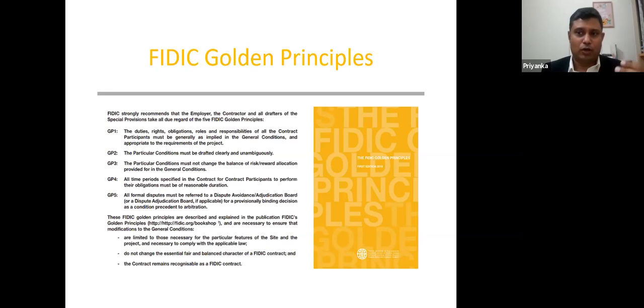For example, we call it pay when paid. In our terminology, we call it back-to-back payment. The contractor will pay the subcontractor only if he was paid by the employer. So the poor subcontractor will suffer because of another person's error. Now, the Housing Grants, Construction and Regeneration Act 1996, which was issued in the UK, has restricted that particular privilege. Even the 1977 version gave some guidance related to that.